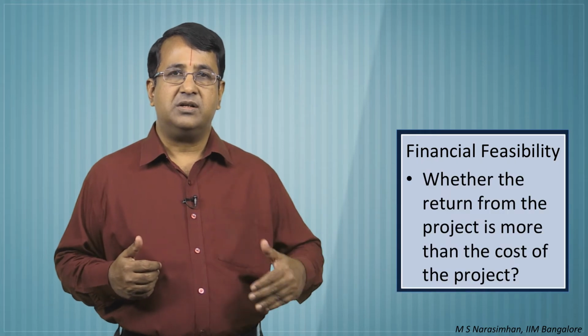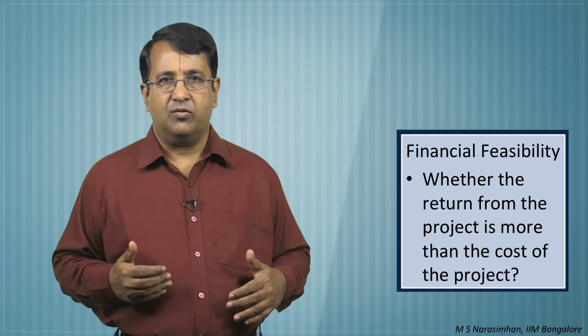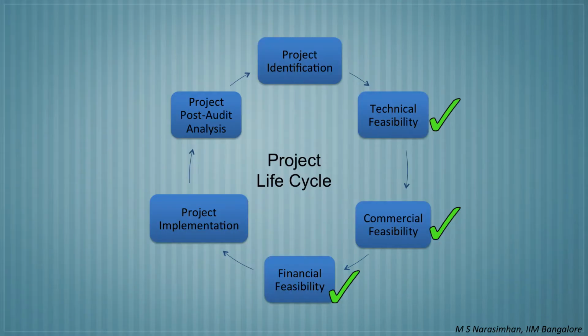Using information collected during the technical and commercial feasibility, the project sponsor or finance department prepares cash flow projections and assesses the financial feasibility. The question answered at this stage is whether the project generates an adequate return, more than the cost at which we undertake the project. Once the project is financially viable and adequate funds are available, the project gets approval and the sponsors start implementing the project.